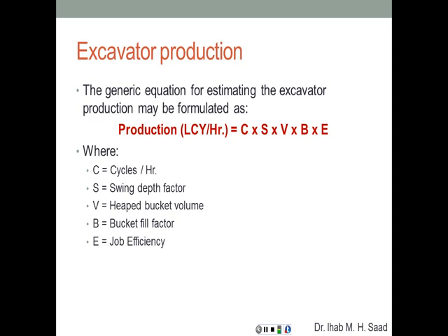How do we get the number of minutes? By multiplying that factor times 60. So 80% is 0.80 times 60, which gives 48 minutes. 75%, 0.75 times 60, which gives the 45 minutes.